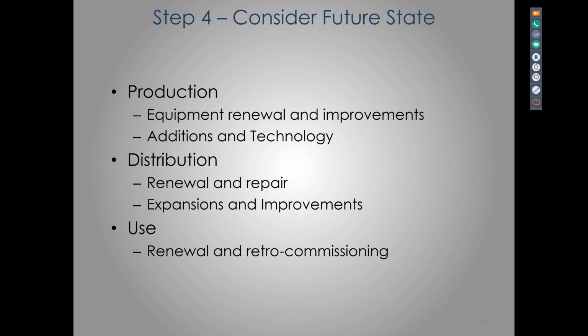At the University of Arizona, the $400 million that I talked about, there were a lot of reviews with our Board of Regents, the state legislators, the president, our chief financial officers, and ultimately the governor came back and said we need to address these challenges. We know the state funds have decreased dramatically for our colleges and universities. Being able to paint the story, having a solid capacity review and roadmaps in place, and a prioritized financial model, really allowed us to work with the state legislators and get an additional $200 million to address deferred maintenance and some infrastructure.